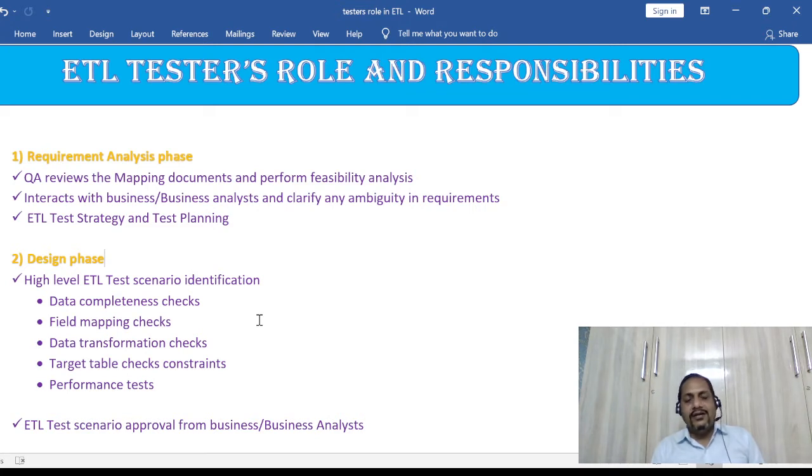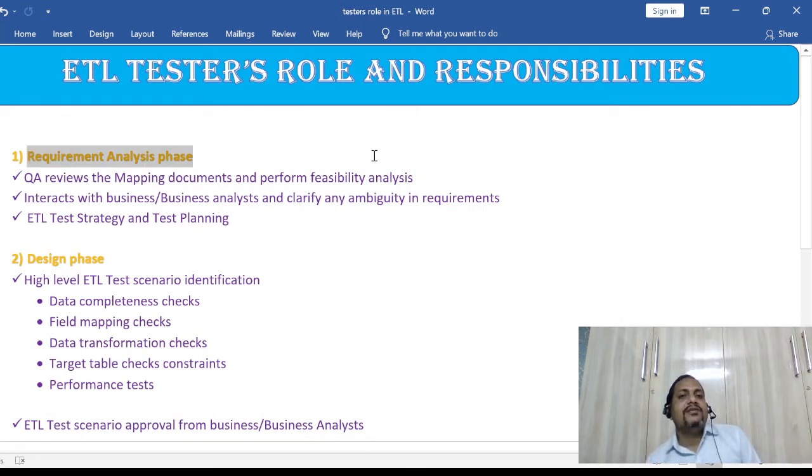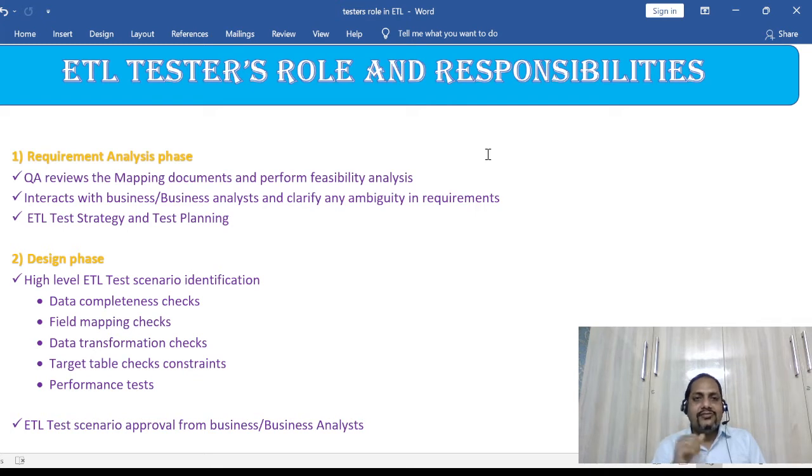Another thing about the waterfall model was that until you complete one phase, you cannot really move to the next phase. For example, until you complete the requirement analysis, make sure the requirements are complete, there is no ambiguity, you get 100% of the requirements and everything is frozen, only then can you move to the design phase, right? And until you complete all the design, with everything in place, you cannot really move to coding, right? So that was one of the challenges before, and as a result of it, the agile methodology came, right?